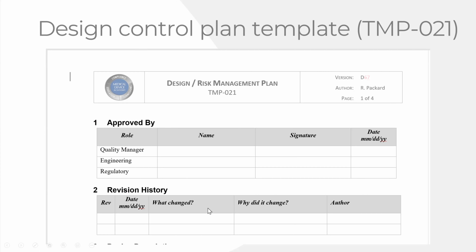The revision history will be at the top, and you can add or delete one of these names. These are just functions of who's going to approve the plan. In general, I recommend whoever is the design team lead approves the plan, and then whoever the author of this document is. Hopefully the design team lead is delegating some things, so it's 2 people doing this. But I have 3 on here. You could have more, but be careful. The more people you have on here, you have to keep on having those same people review and approve every single time you revise. So the fewer people you start with, the fewer people you need to make edits as well.